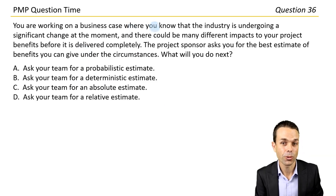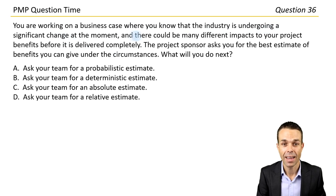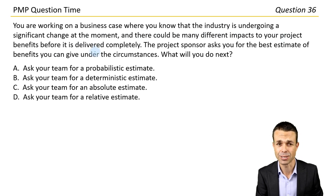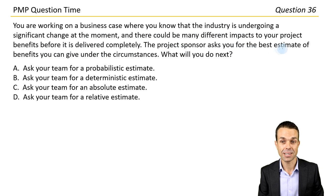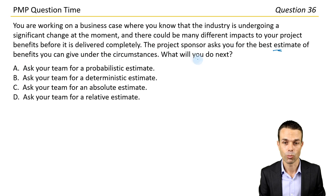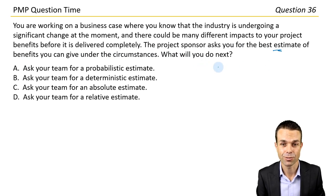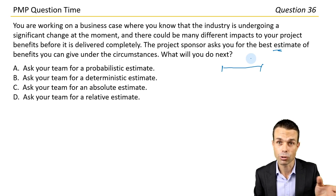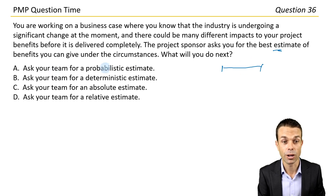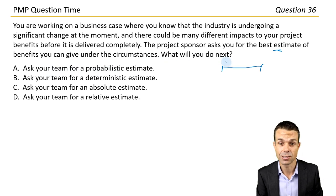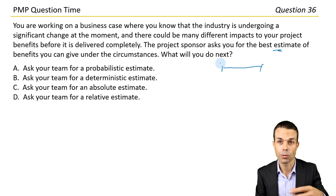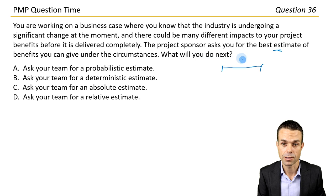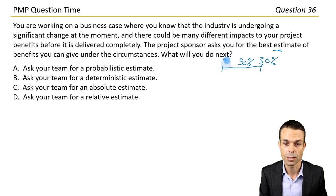You are working on a business case where you know that the industry is undergoing a significant change. There could be many different impacts to your project benefits before it's delivered completely. Your project sponsor asks for the best estimate of benefits you can give under the circumstances. What will you do next? Option A: Ask your team for a probabilistic estimate — that is a range with probabilities attached to it. Maybe there's a 50% chance of this outcome, a 30% chance of this one, a 90% chance of this one. That's pretty handy.